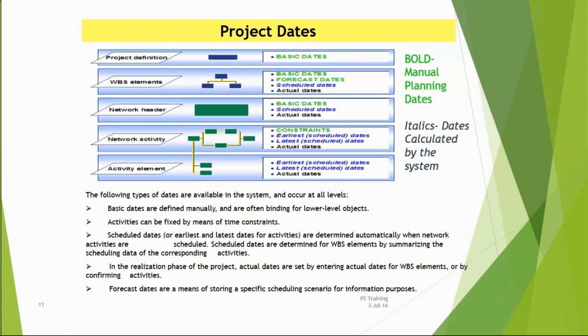and my schedule dates. I am going to schedule periodically; every time I will be coming and changing my schedule dates. My planning will be changing each and every day. And my actual dates are when exactly my confirmations take place. Like in CATS, I will be booking my timings. Whenever I book my timings in CATS, those are the confirmations, those are the actual dates.